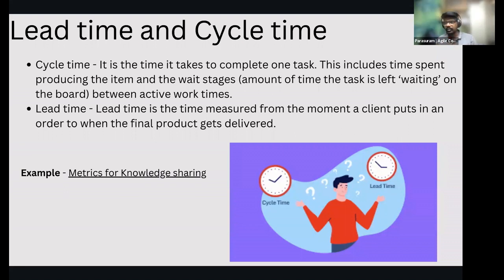People said, hey, the testing is taking time, or if we have to build, it is taking a lot of time. Then, as a retrospective comment, hey, how could we improve the build? One particular developer came up with an innovation where he reduced 5 hours of build time into just 3 minutes. That eventually saved us 2 weeks of time in the future, because every time he built, it was taking 5 hours. After this, it was just 3 minutes, right? Every change he did, he could build immediately and get it tested. So the feature delivery time got reduced.